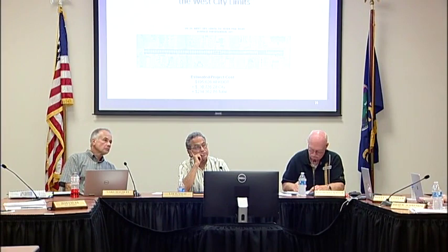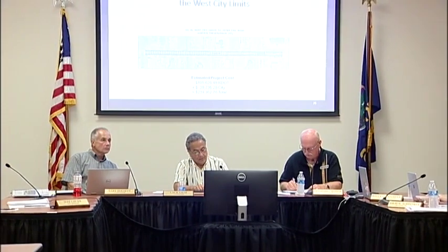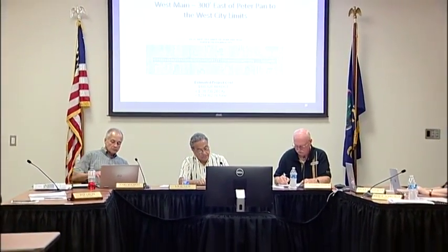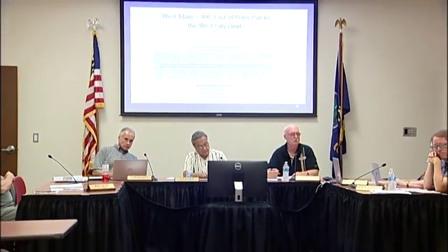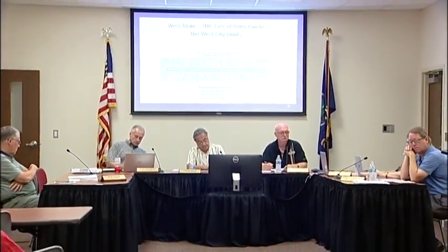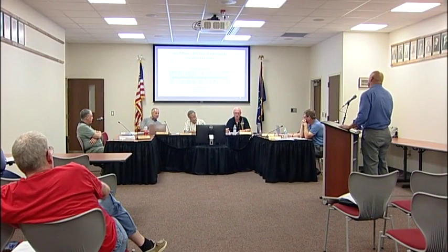You're in much better shape with KDOT allowing the city to revise that application so you could do the white topping, or worst case, if conditions don't allow, you're just back to doing what the original project was, which was a mill and overlay. If we do white topping, I don't believe this money is going to go all the way to the city limits. It's going to fall short still, but under this program, that's the maximum amount you could get from KDOT, the $300,000. So that's why it will end at some point. So with white topping, we'll adjust the extent for the money available.